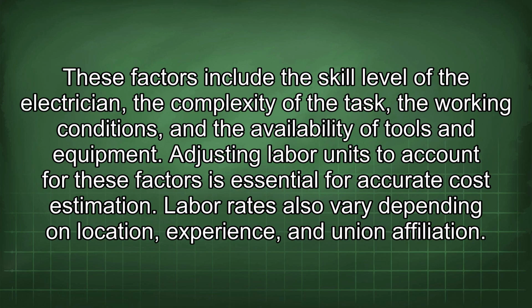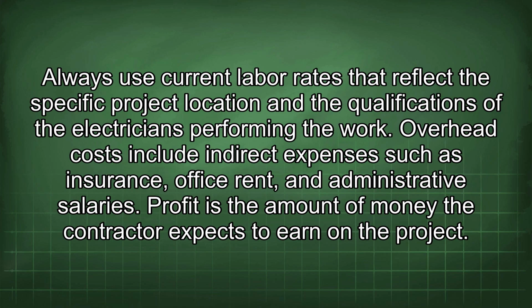When using labor unit manuals, it's crucial to understand the factors that can affect labor productivity. These factors include the skill level of the electrician, the complexity of the task, the working conditions, and the availability of tools and equipment. Adjusting labor units to account for these factors is essential for accurate cost estimation. Labor rates also vary depending on location, experience, and union affiliation. Always use current labor rates that reflect the specific project location and the qualifications of the electricians performing the work.